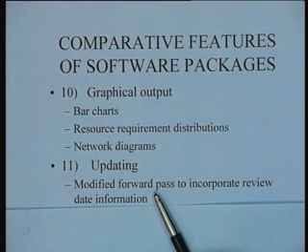Activities which are going on, an activity that was originally scheduled to take 10 days, you now estimate that a portion of it is done, but it is going to take maybe 6 more days. And activities which have not been touched yet, their durations are as they were before, or if you feel at this stage that they are going to take more or less, you can take a revised estimate.